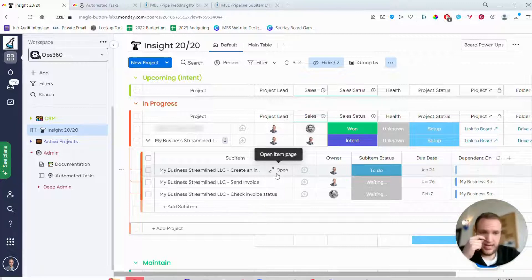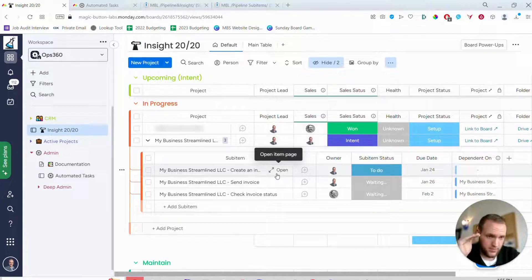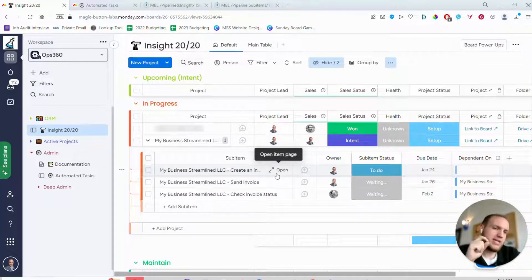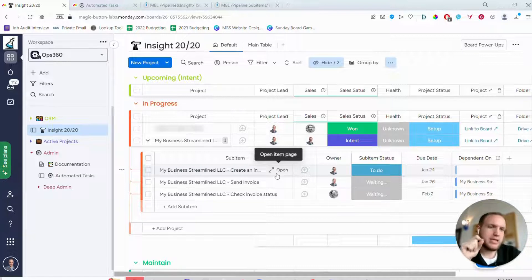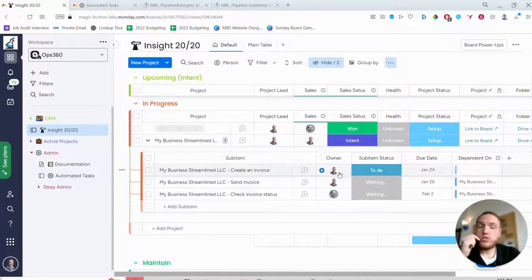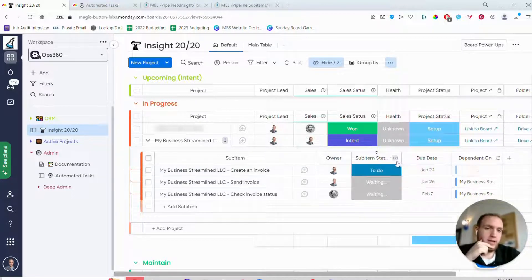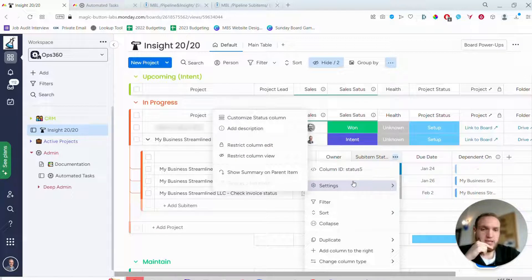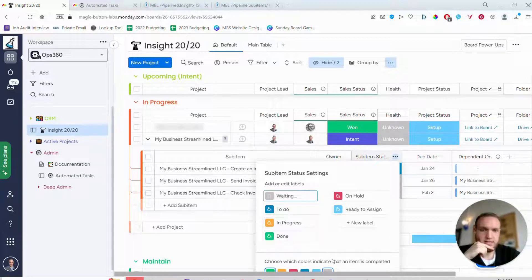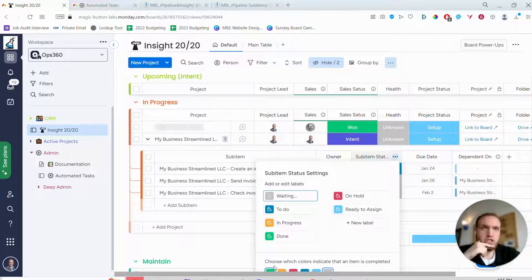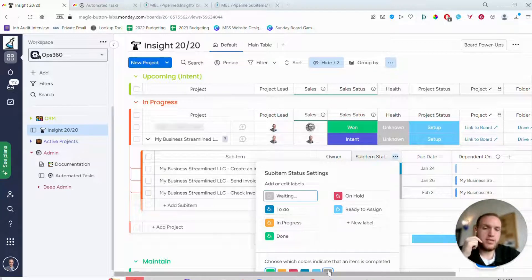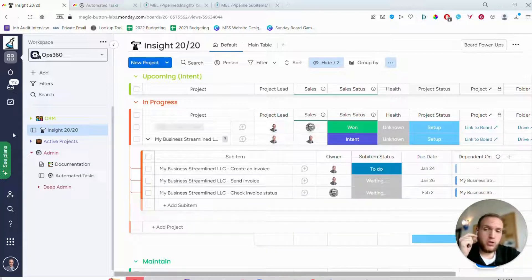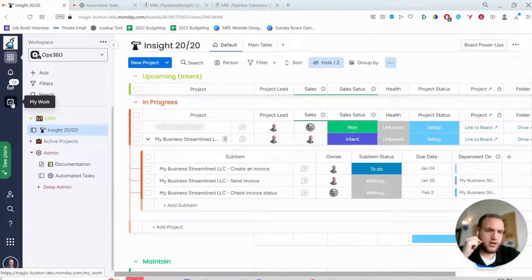Now the reason for this is that we want to create all the tasks so we have them listed out, but we don't actually want to assign people yet until they can actually start on it. So I use a little trick in the status column. If you go under settings, under customize status settings, you can change one of the statuses, in this case waiting, to pretend like it's done.